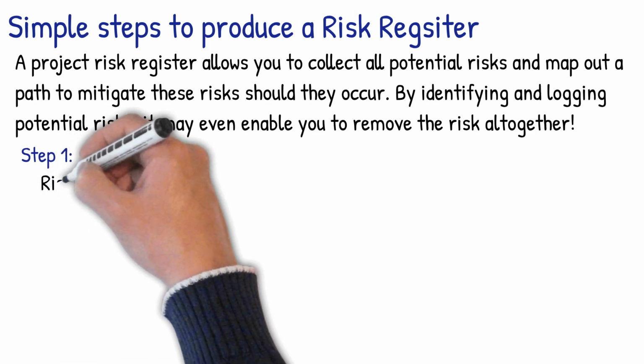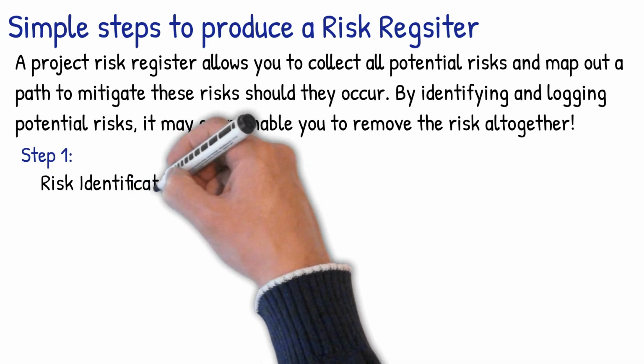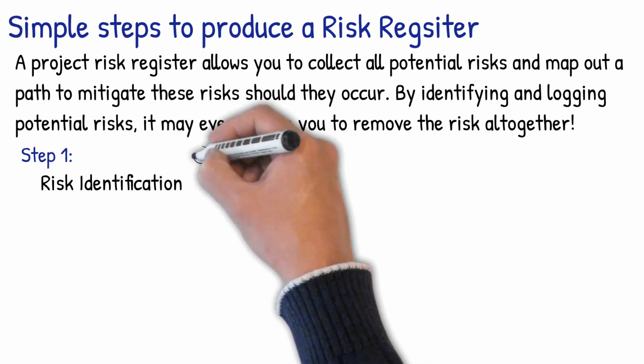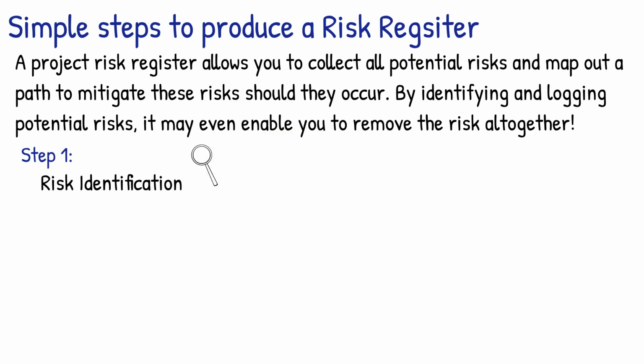Number 1. Risk identification. First, risks must be identified. Every team member is responsible for different areas of the project, so be sure to gain input from the designers through to the bricklayers and even stakeholders outside the immediate construction activities. Be sure to exhaust all potential risks from the market forces and even the weather.